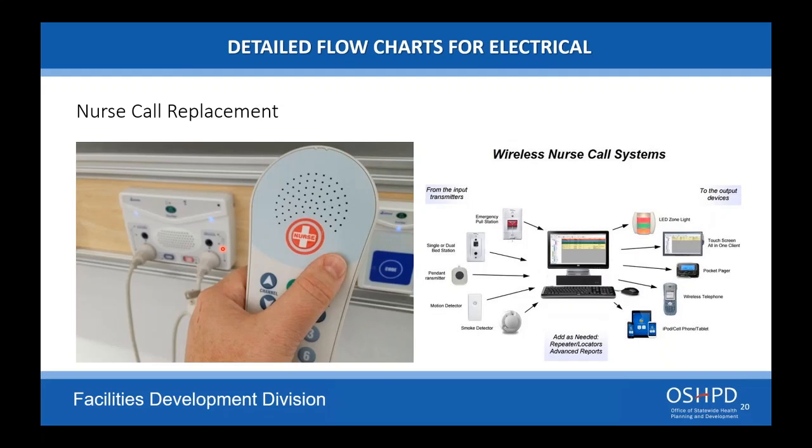Nothing else is required to the rooms, etc., to be done when you're replacing these units. If you have to replace the conduit, same thing. Or the electrical that connects everything, the low voltage, same thing. That's all you're doing, is replacing this unit. You're allowed to do what's required to replace the nurse call unit.